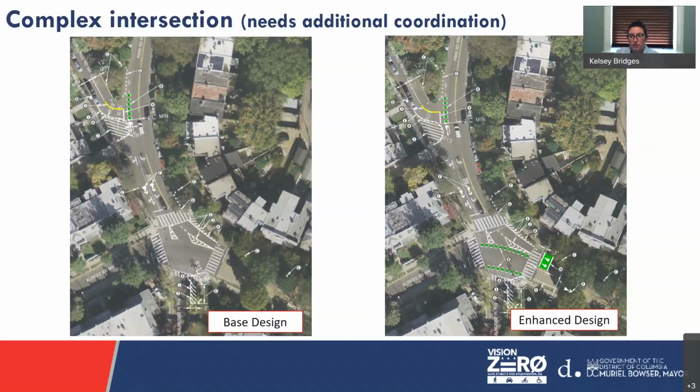The base designs in general, we feel more comfortable could be completed within 1 to 3 years, and the enhanced designs may be on the outer edge of that because analysis needs to be done. And that would also include further community engagement as well.